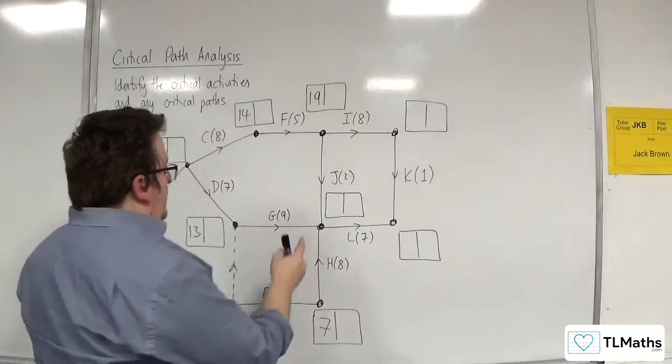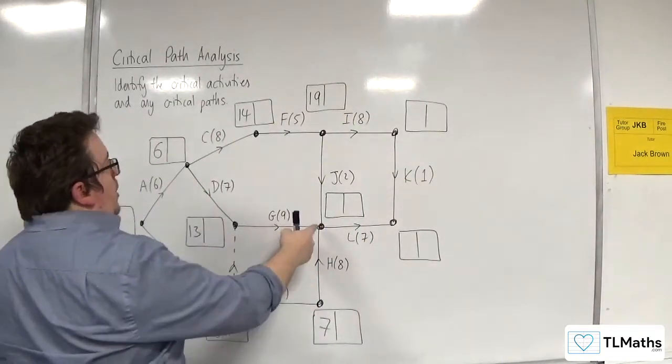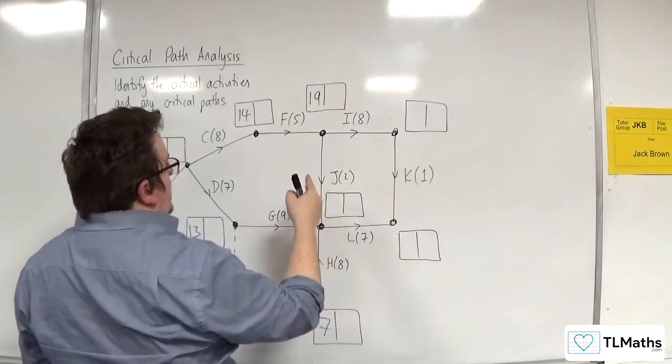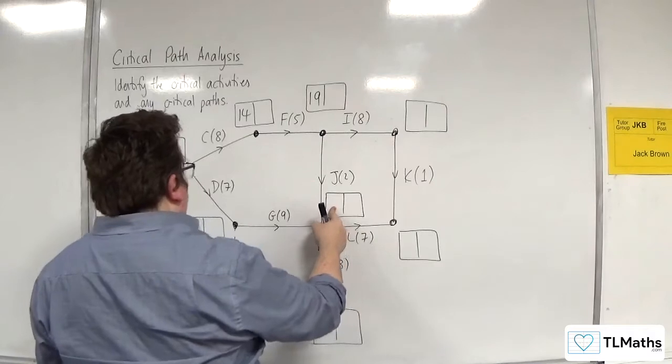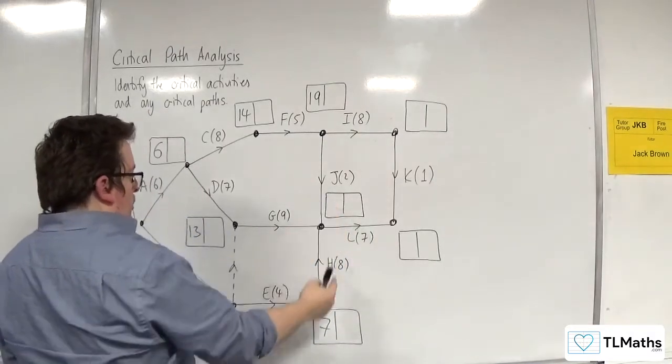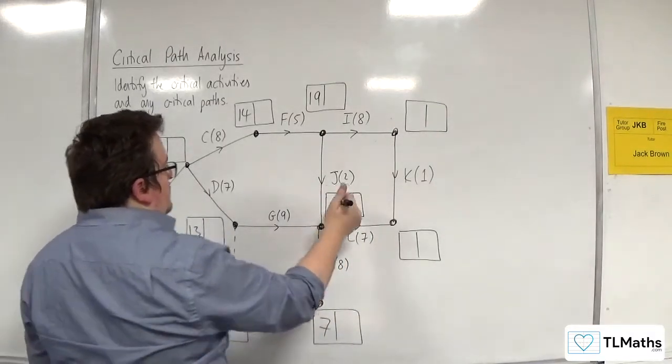So for this one, we've got 19 plus 2, so 21, or 13 plus 9 is 22, or 7 plus 8 is 15, so 22.